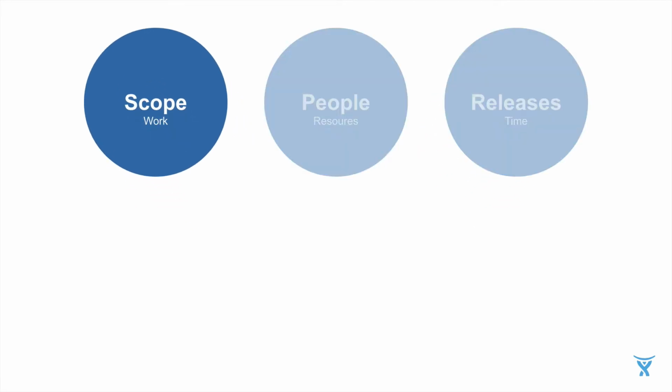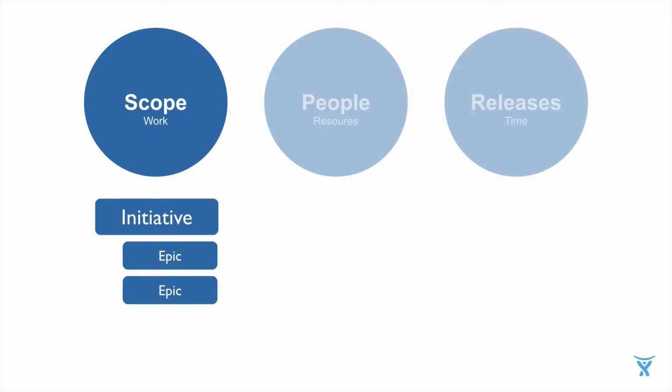In the scope section, the most important entity is the hierarchy of issues. Out of the box, we recommend to structure into initiatives, epics, and user stories. Stories and epics are familiar things you might know from using JIRA Software, but Portfolio adds additional layering on top of that.